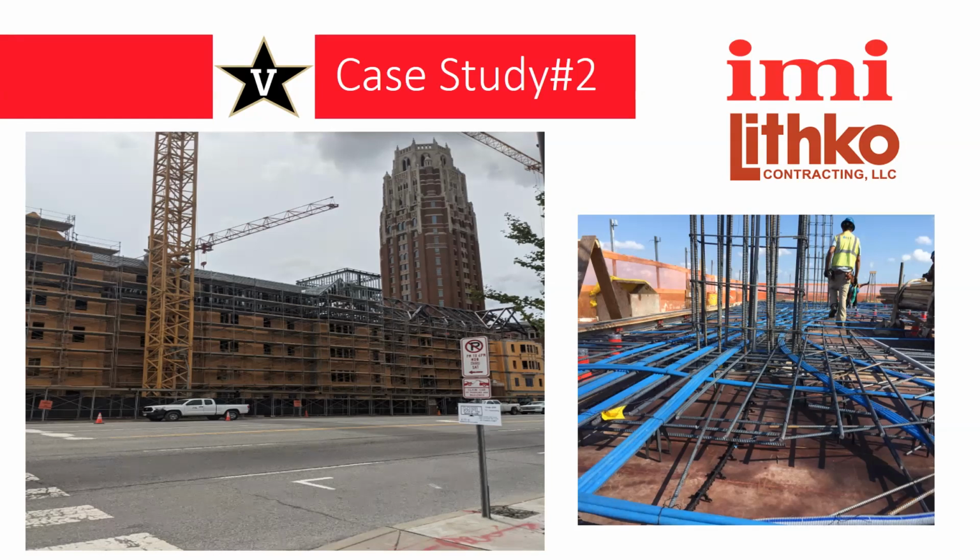So we actually, as bad as it sounds, had to use a straight cement post-tension mix design during the winter. But because we were using the CarbonCure technology, we were able to reduce at least 25 pounds per yard of cement for the whole project. So not only did we get good 28-day results, during these colder months we were able to achieve 3,000 PSI within 1 to 2 days. So no delays on the schedule or anything like that.